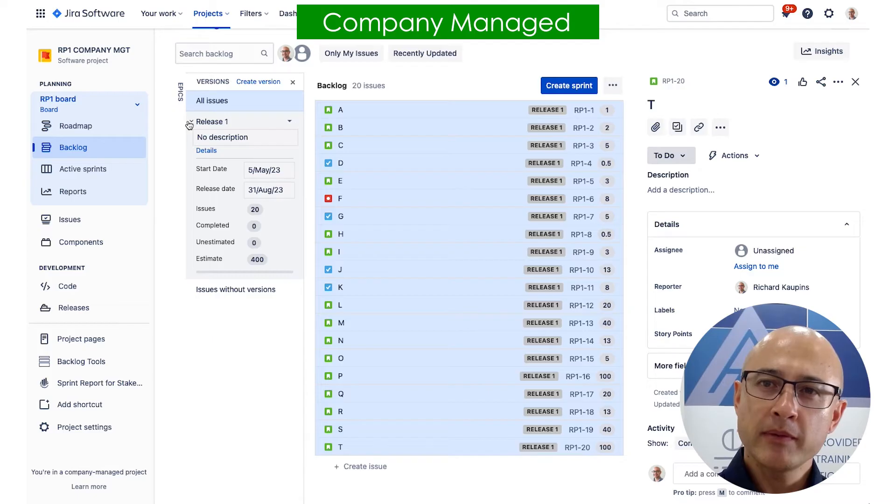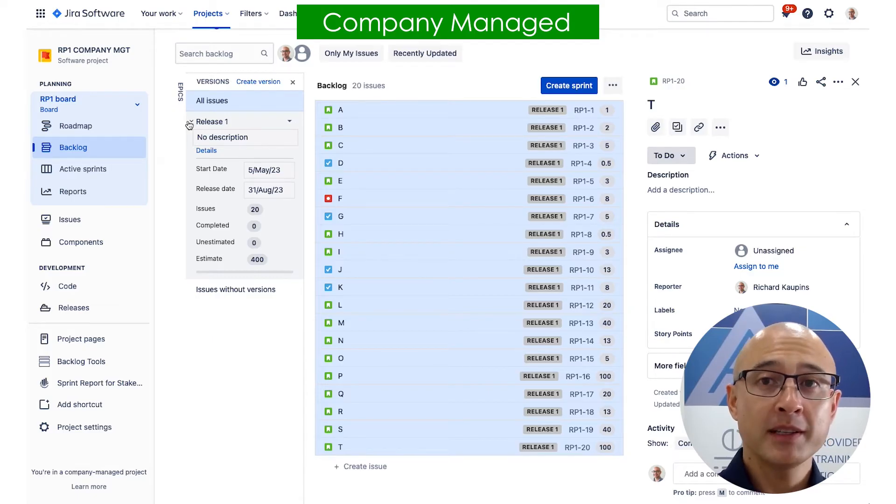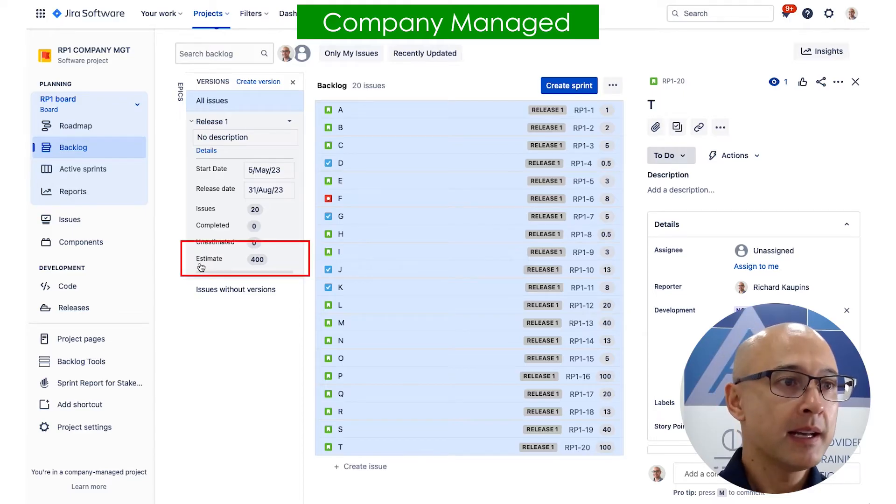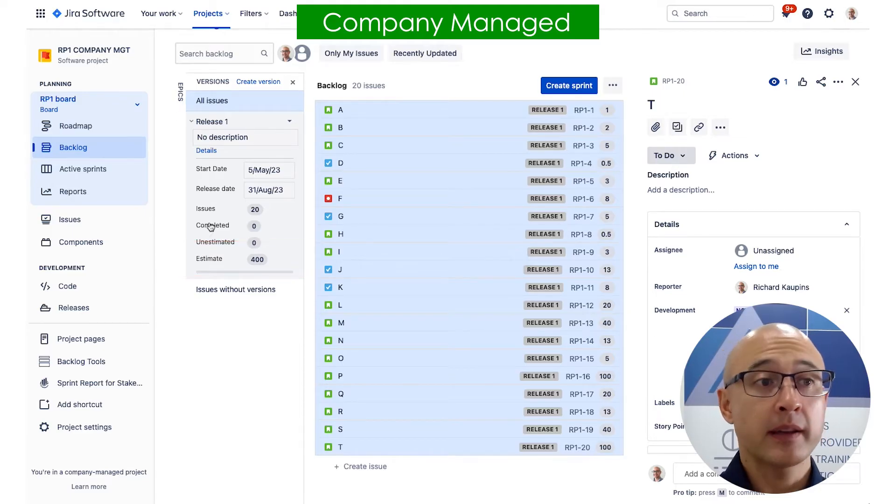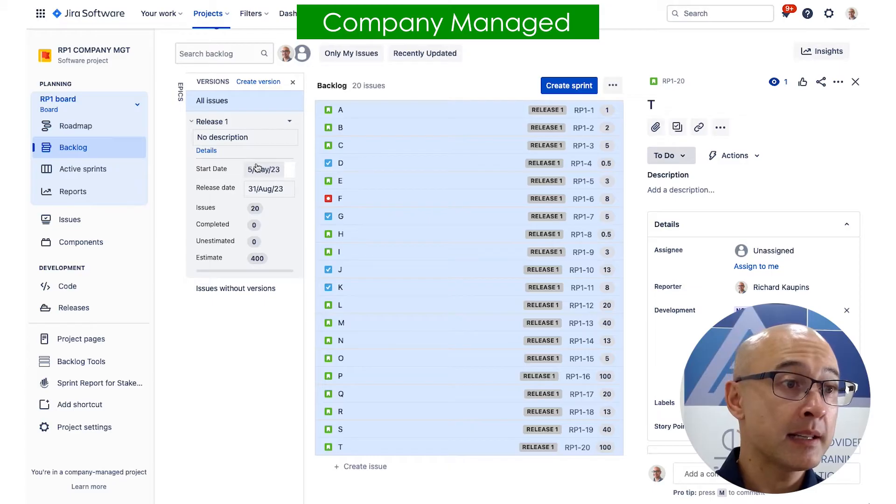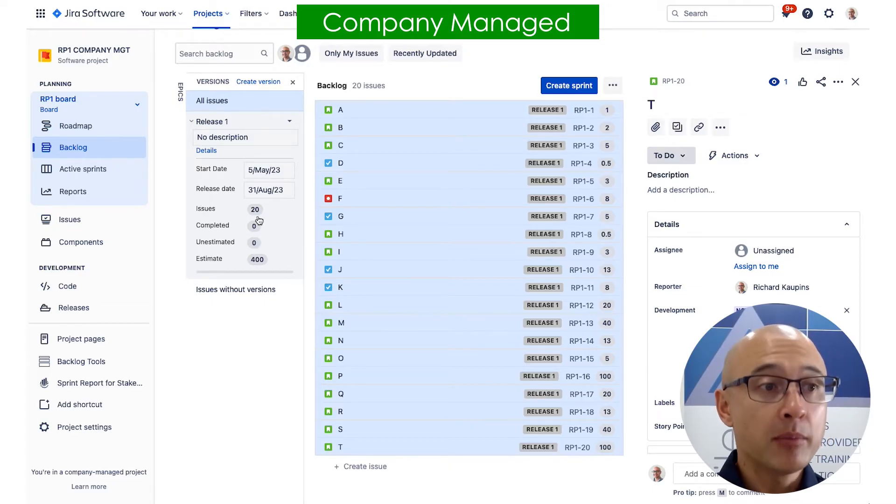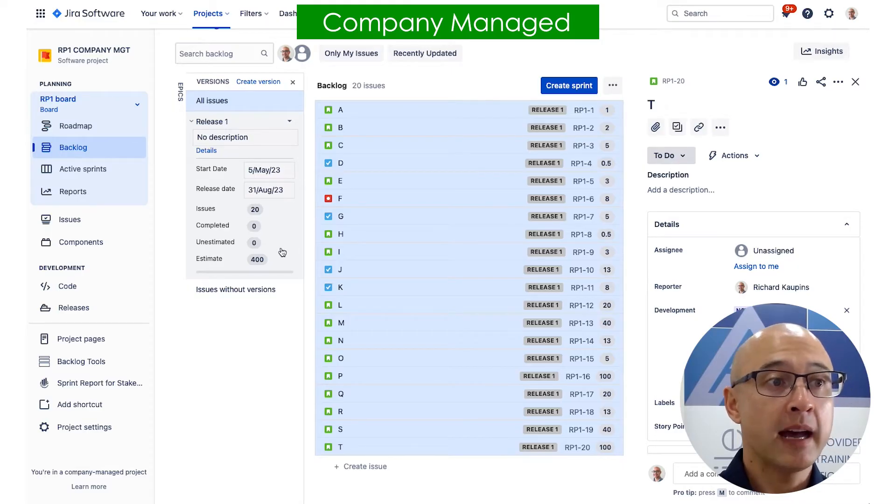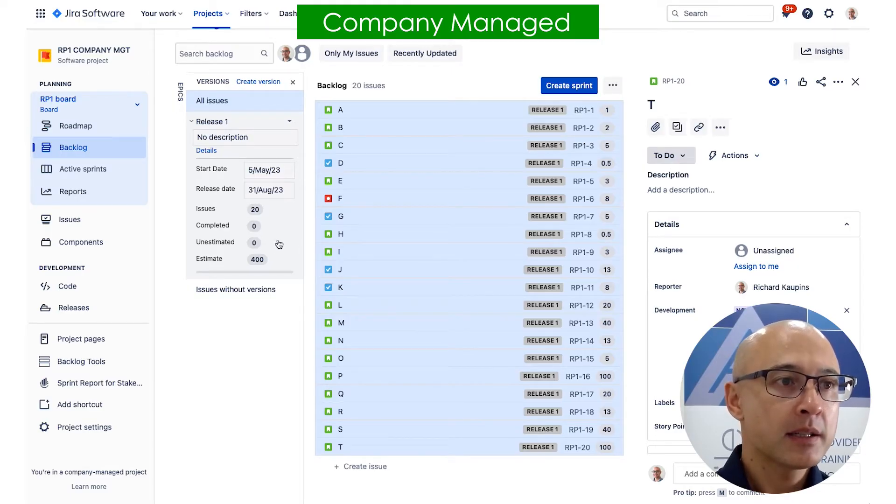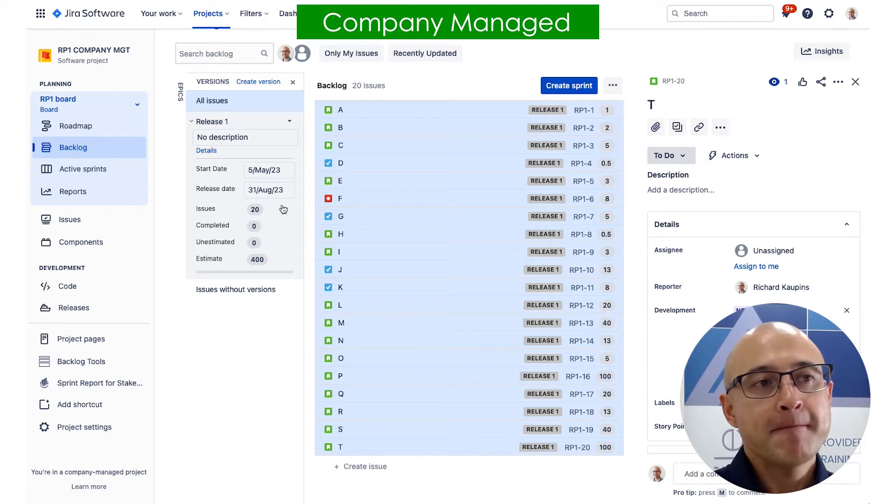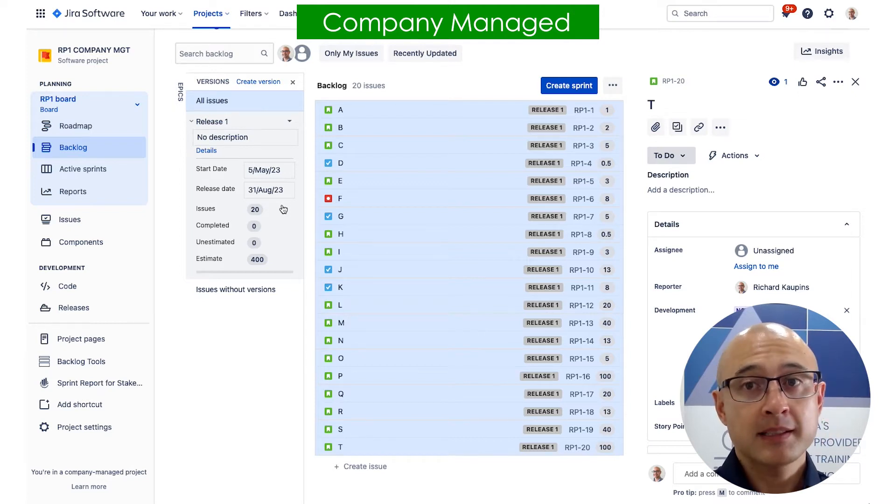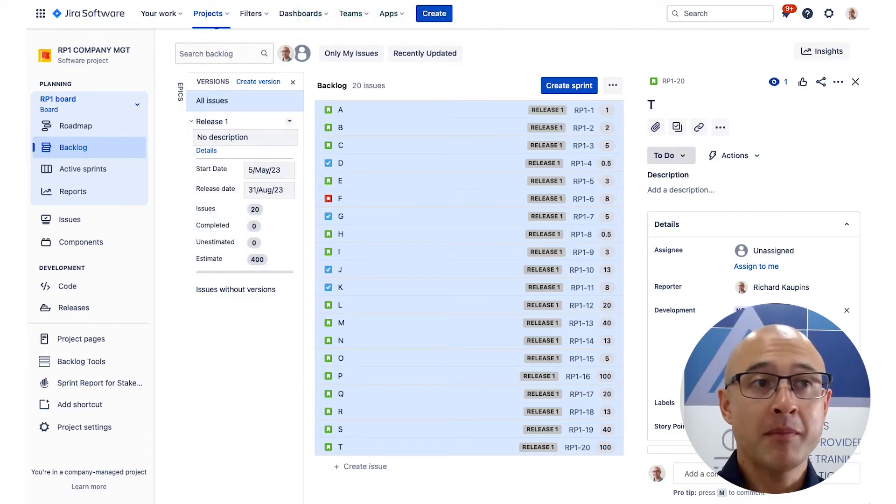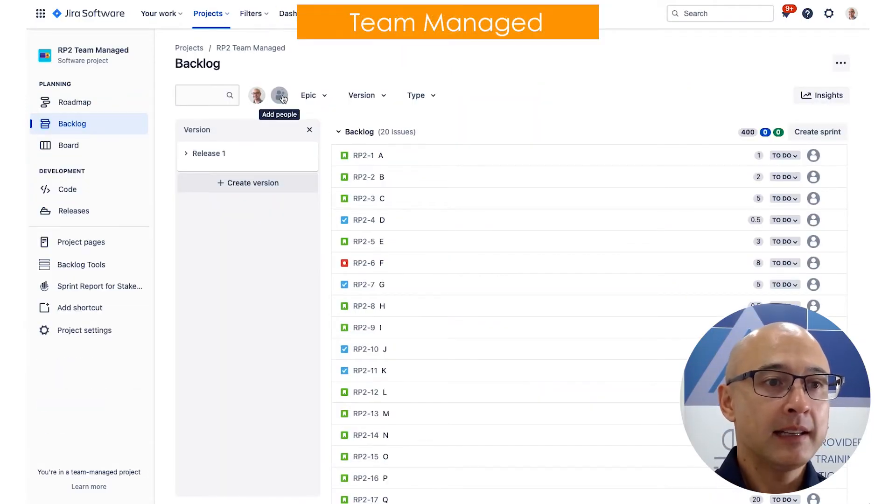So if we open up the release panel here and we take a closer look, now we can see some interesting information. So remember the total number of points in my product backlog was 400. Well, it's put it right there. And we can also see a few other things. We can see those dates that we set before, we can see the number of issues in there, which ones have been completed, and which ones don't have an estimate. So this is very useful. However, remember, this is a company managed project. Now let's have a look at a team managed project, and it's going to be a little bit different.